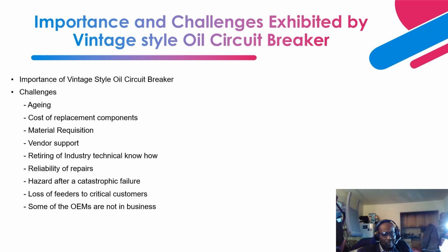Next is the material requisition. Like I indicated, apart from the fact that the components and the parts are very costly, creating the material requisition and getting a vendor to provide it or source it out to you can sometimes be very challenging, especially for oil circuit breakers whose manufacturers have gone out of business.